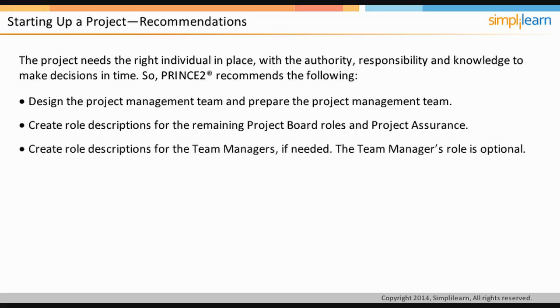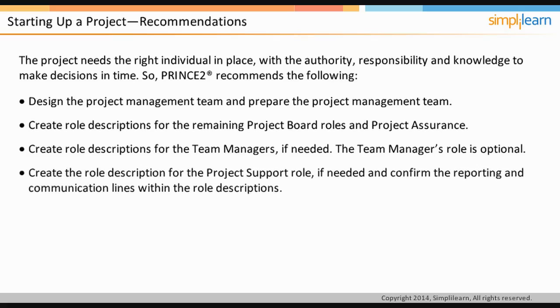Create role descriptions for the team managers if needed. The team manager's role is optional. Create the role description for the project support role, if needed, and confirm the reporting and communication lines within the role descriptions. If risks are identified, add them to the daily log.